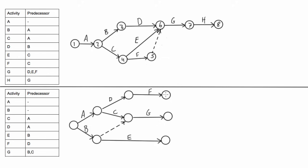But this is going to leave us with three nodes at the end of our project. If we wanted we could draw on dummy variables connecting F to G and E to G or to this node at the end of G but then we're just introducing extra dummies that we don't need.